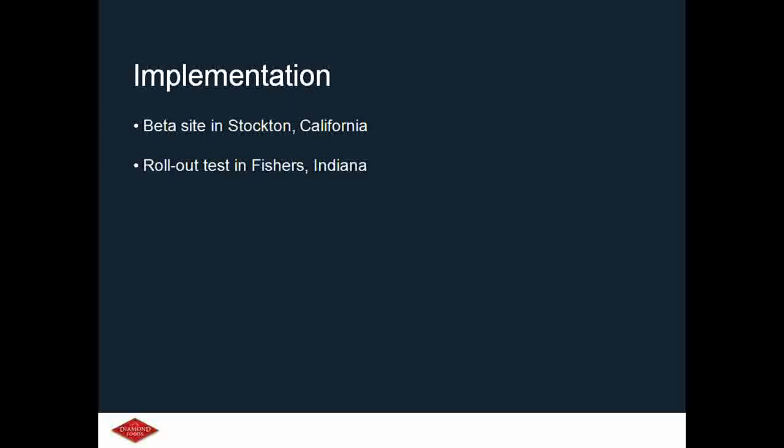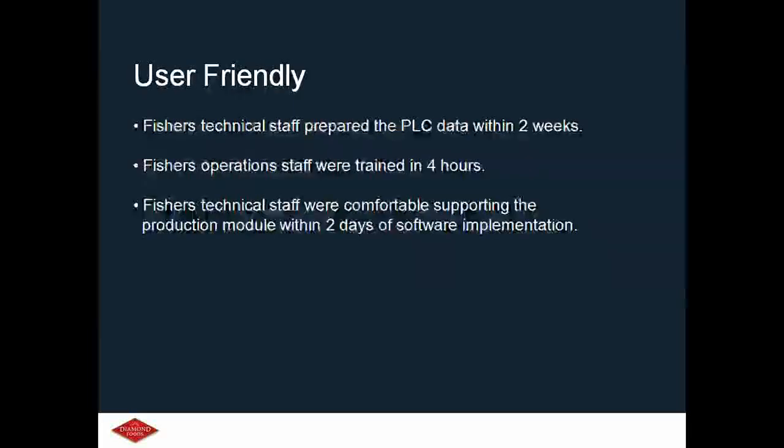It was really interesting because the Fishers implementation gave us an opportunity to evaluate the software through the eyes of people who had not been exposed to it. So it was a really good rollout test. The Fishers staff spent a couple of weeks preparing the necessary real-time PLC data links, and Inductive Automation then did the software implementation over a web link, and we were collecting data at the end of the first day.